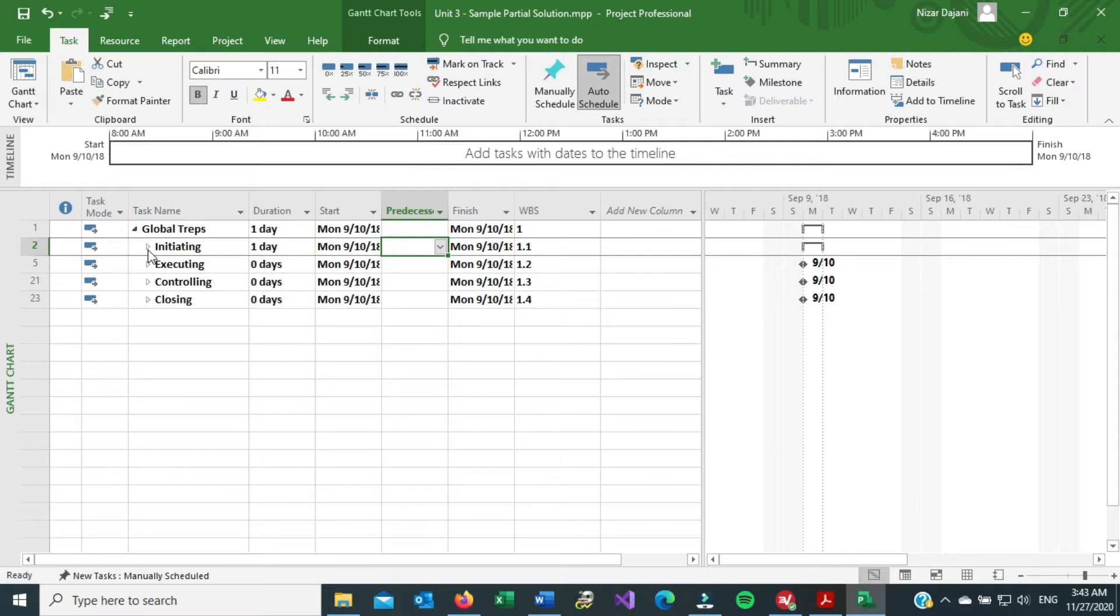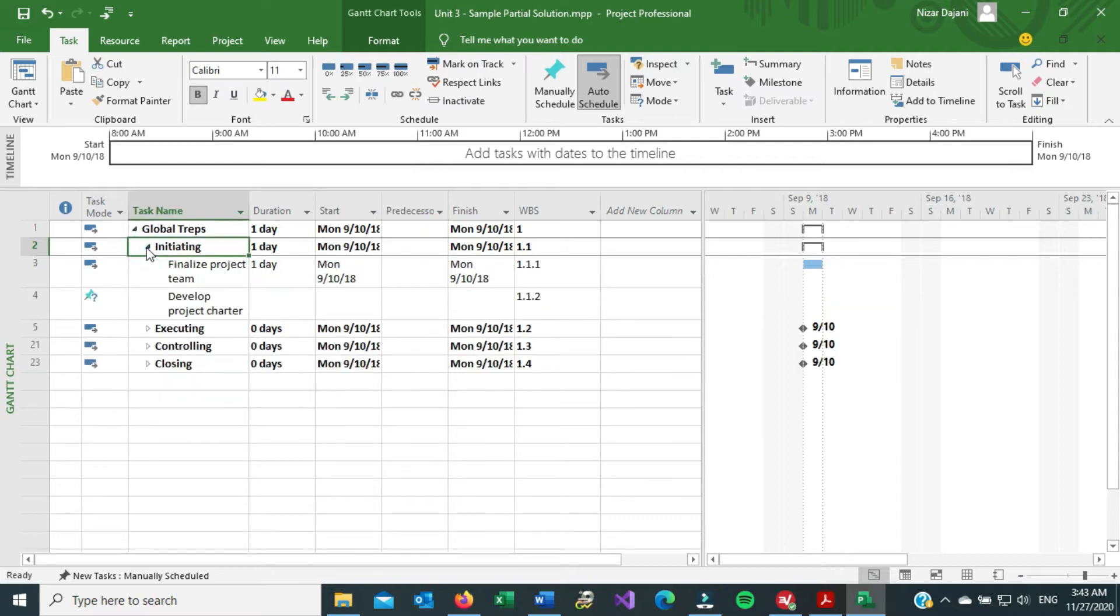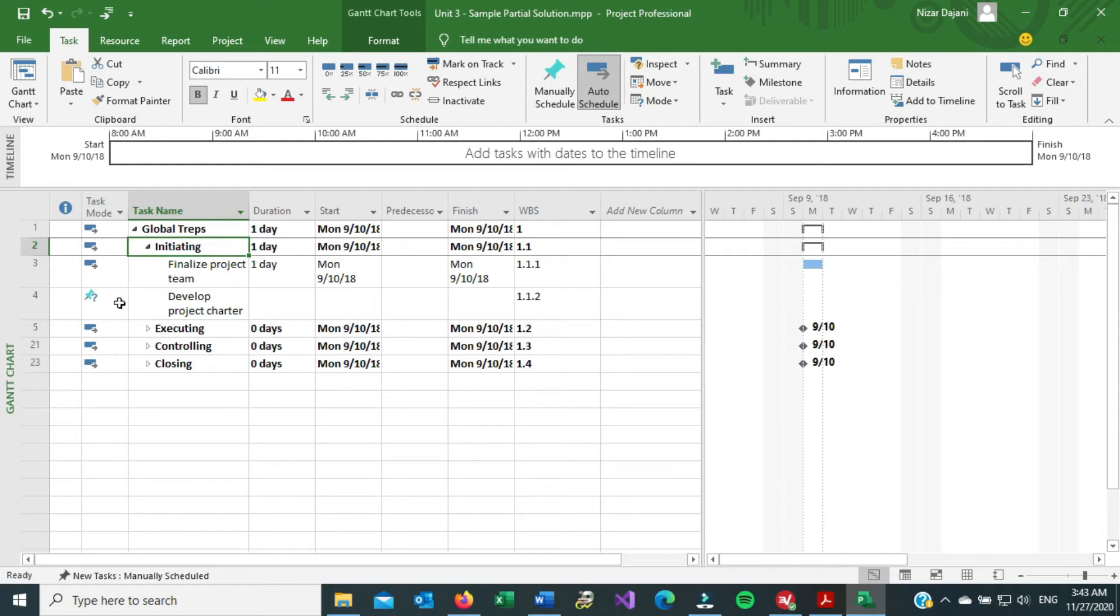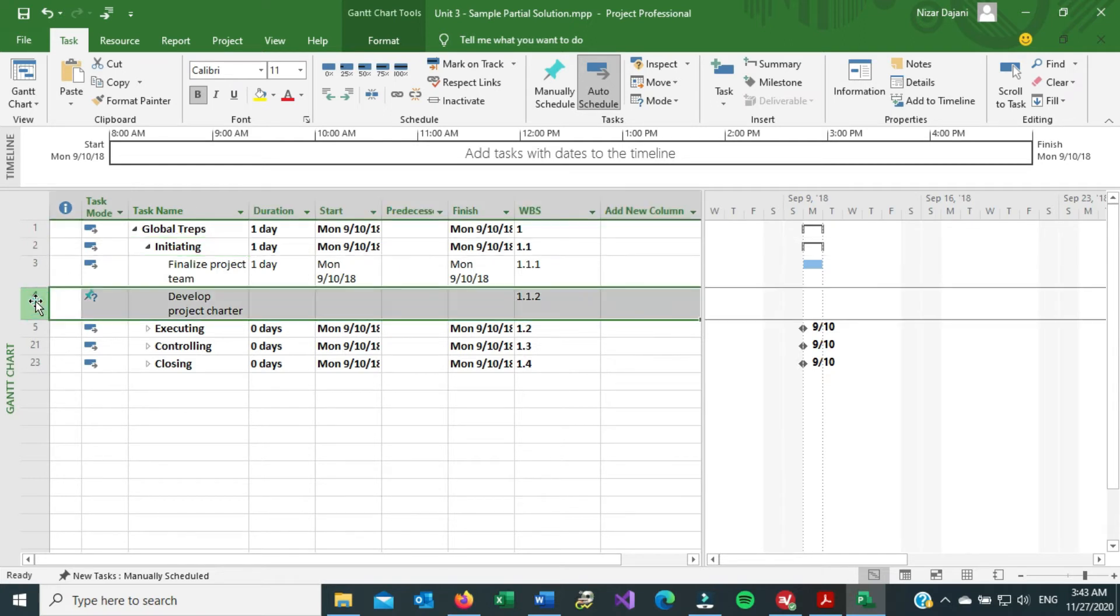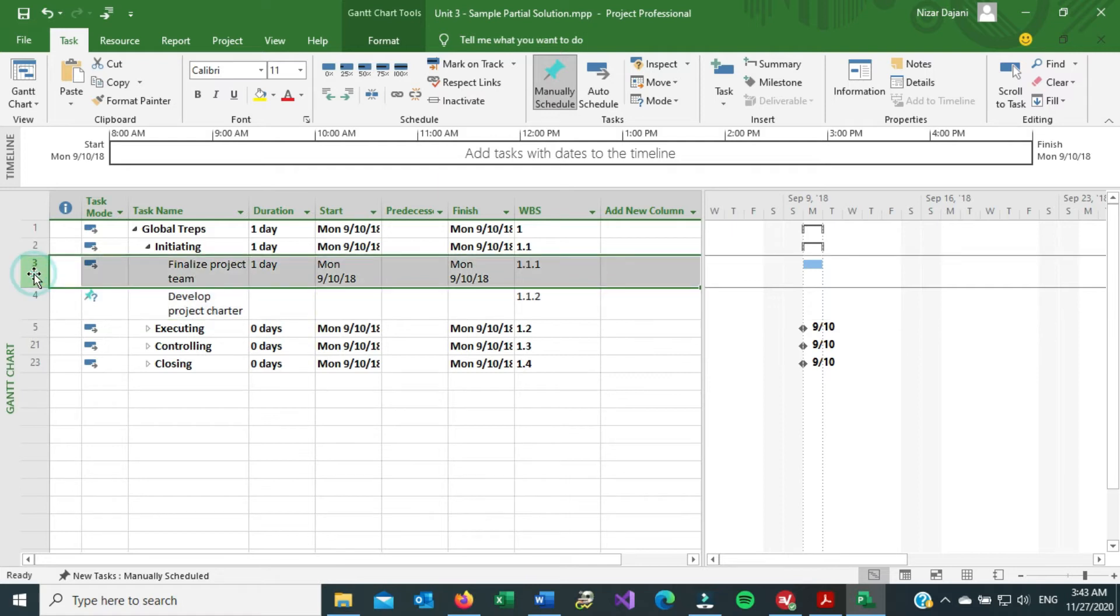So for example, I'm going to expand on initiating, and this is not a full project file because as you can see, I don't have planning in here. But in initiating, it says the develop project charter has a predecessor of finalized project team.